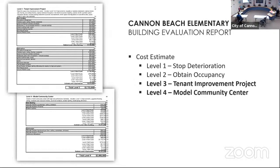Yeah, it depends on if it's a firewall versus a fire barrier. There's different requirements. Firewalls, yes, they have to extend up about 30 inches. Alternatively, you can go horizontally. So on that breezeway canopy, you could extend out fire protection 4 feet horizontally in this case. You don't have to shoot the wall past. Yeah, and that wouldn't break the roof pattern. Right. Okay.